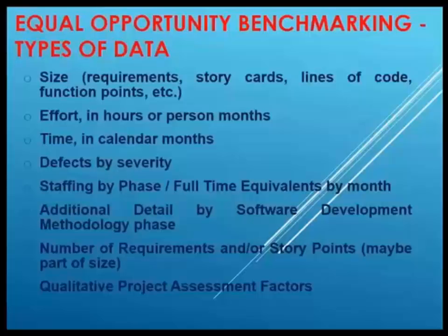Another type of data that we collect, of course, is the time. How long did it take in calendar months? And size, effort and time are all part of the calculation for productivity in the SLIM suite of tools.